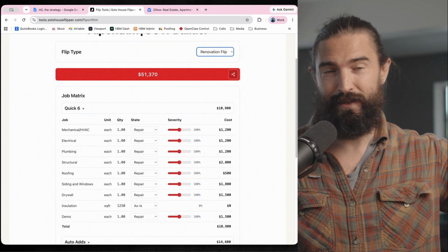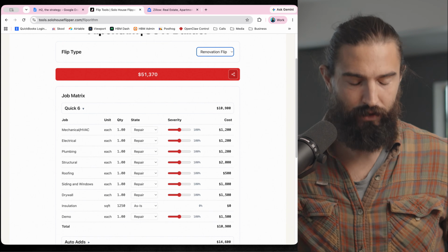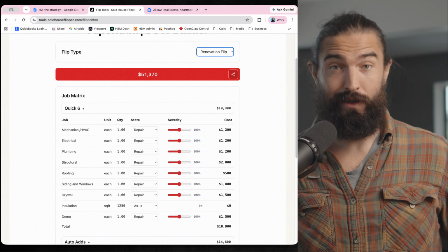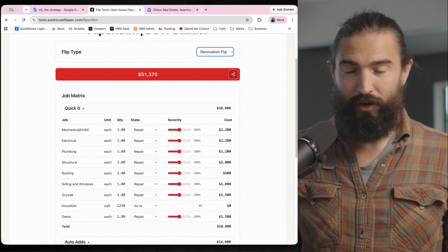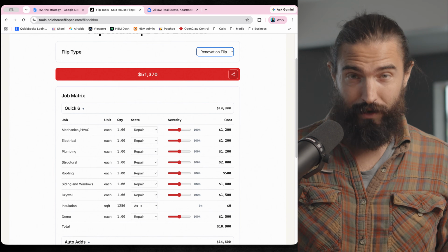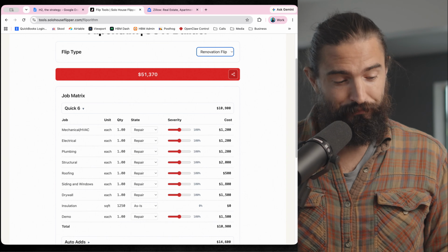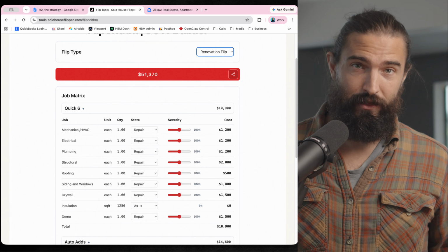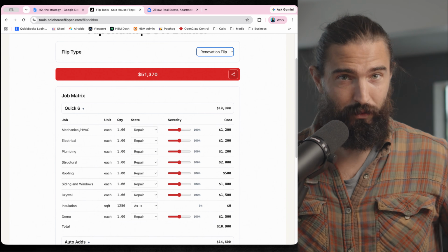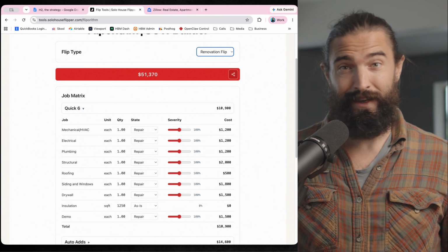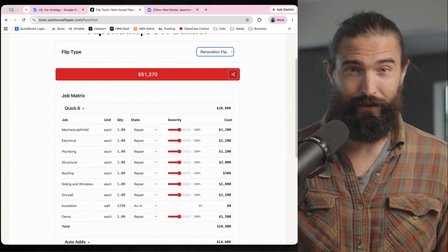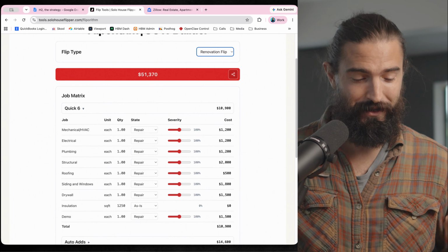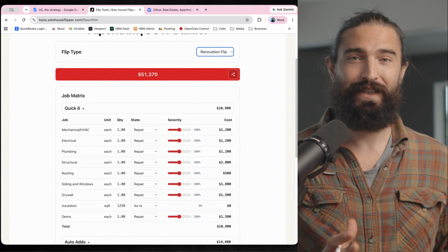But then this other thing, the gutters, whatever, that he didn't know the price of, let's boost that a little bit because he doesn't even know. This is what all contractors do, guys. And that's why they say get 3 bids, because one contractor will come in at $2,260 and the next guy will come in at $800. I'm not kidding you. They are so vastly different.